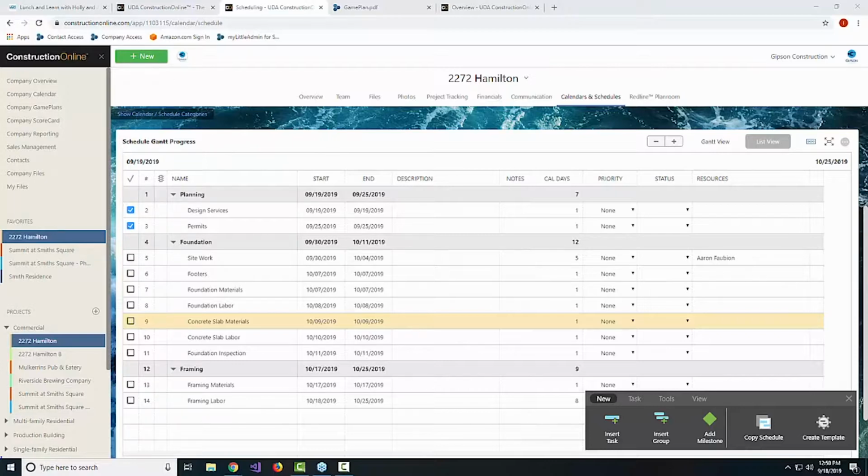Just like you would expect your team to post things like daily logs and updates from the field, or you yourself need to be keeping up with your own logs from the field, you really should be keeping the schedule up to date as well. An out-of-date schedule is virtually worthless to anyone involved on the project, because it's not keeping you up to date on what you've completed to that point, and it's not helping you plan ahead for the future.